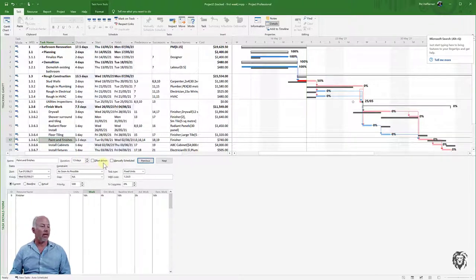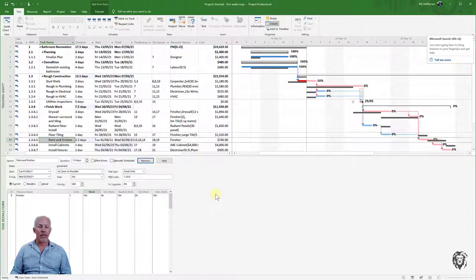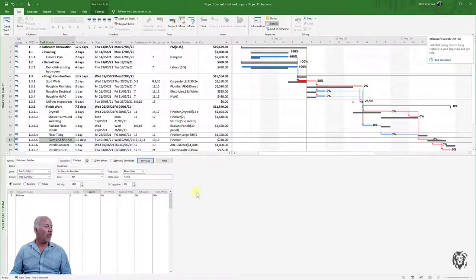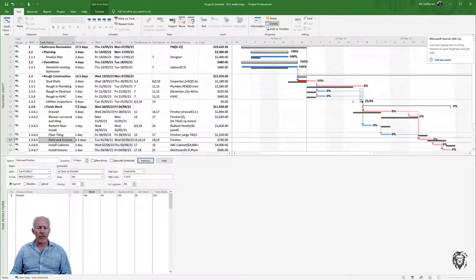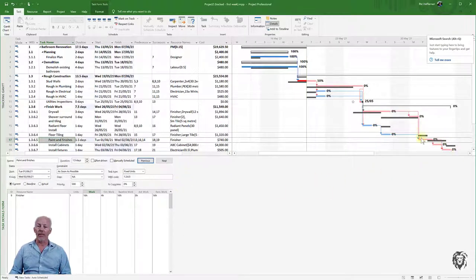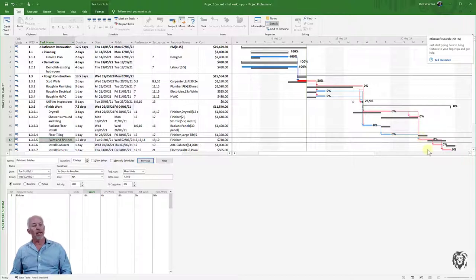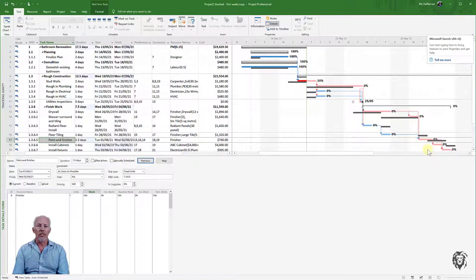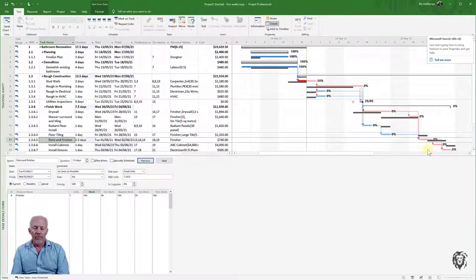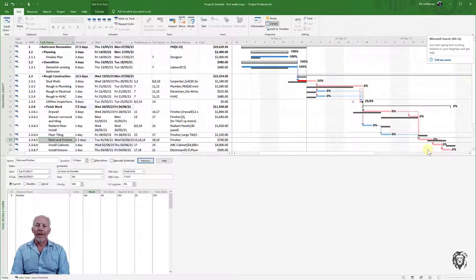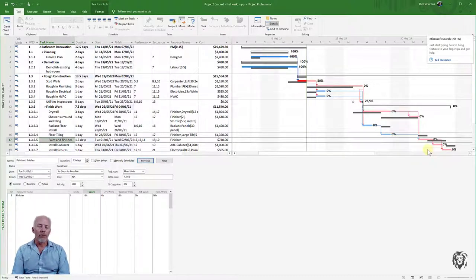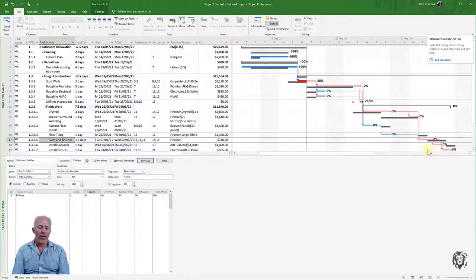They'll be on site for either two hours each day or four hours one day. This shortens our project by half a day because it was on the critical path. There are lots of things you can do to spend money to buy time, and doing it efficiently is an art in itself. What I hope to have covered in this tutorial is managing that process in Microsoft Project.